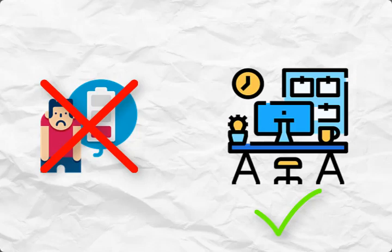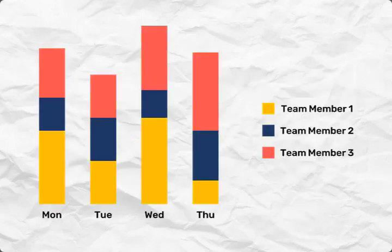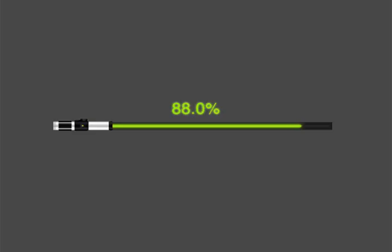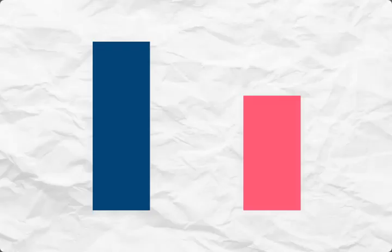Another benefit of resource histograms is their ability to track project progress. By comparing planned versus actual resource utilization, managers can identify any deviations and take corrective measures to keep the project on track.